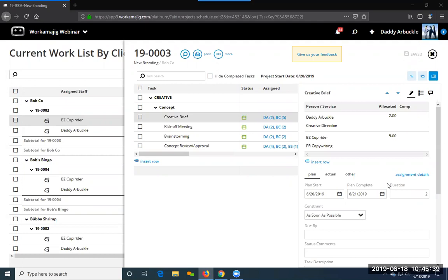If a person is on PTO, can they still be assigned to a task for that day? What we'll try to do on PTO is, if it can be pushed off, we will. So if it's a 3-day task and you're out one of those days, it'll put the allocation onto the other 2. But if it can't, those hours will remain on the task, thereby probably putting you over. So it'd be up to the PMs to come in and say, oh shoot, that task is a 1-day task and that person's out of the office, so they would need to reassign it. But it tries to move it off if it can.